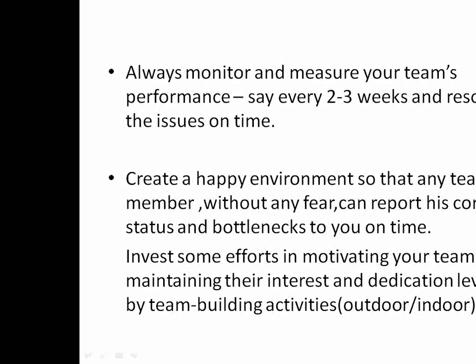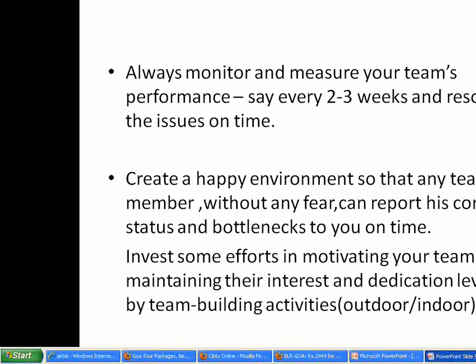So scope should be very well defined, the boundaries should be well defined. I will personally suggest test-driven development, because it ensures that I am within the boundary, within the scope. I don't deliver or write some piece of code which is not really needed by the client. I only do what is needed. Test-driven development I can use. So you should always define your boundaries, what is in scope and what is out of scope for the current release.